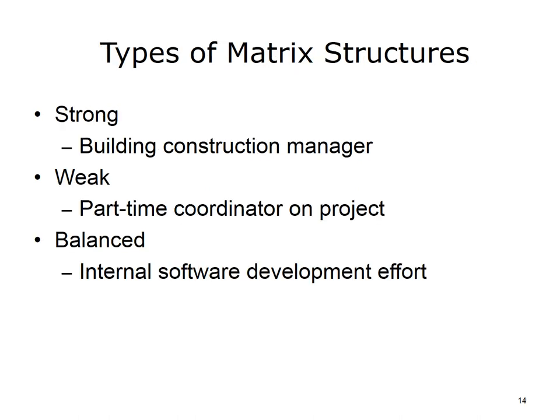In a strong matrix, the project manager has all the power. This may be illustrated through a construction site manager who manages all the subcontractors, all the inventory, and is ultimately responsible for the end result — the building being built to specifications. In a weak matrix structure, someone may be called a project manager, but he or she has little or no authority or power. In reality, this type of manager is more of a part-time coordinator on a project. A weak matrix often indicates that an organization is not far down the path on managing projects according to the Project Management Institute's model.